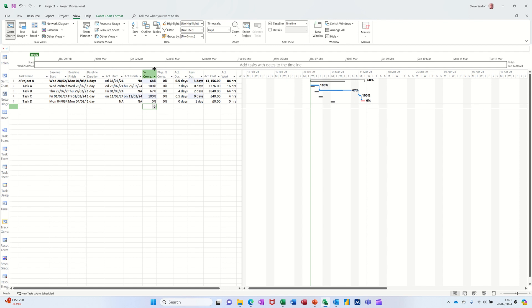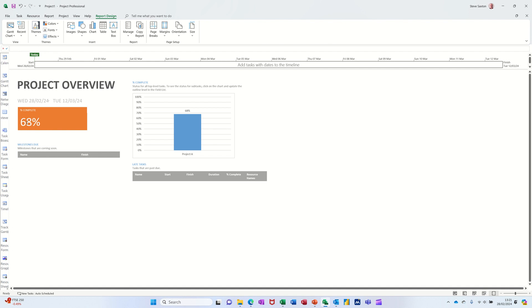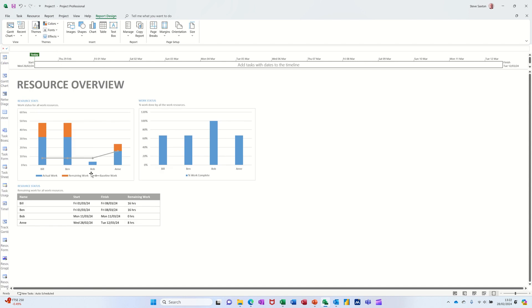While you're doing all of this, you go to the report tab — there are loads of preset reports you can use. So you've got project overview — it's a simple report that adjusts as you update tasks. If I go to resources, resource overview, you can see planned resources, actual work, remaining work, baseline work and things like that. Baseline work is shown down here, actual work is going up, and you've still got work to do because some tasks are not complete.